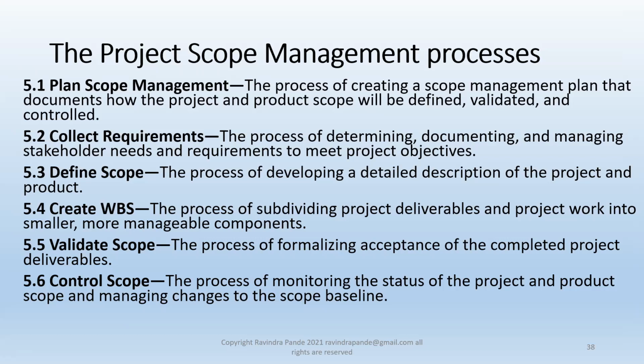Create WBS is a process of subdividing the project deliverables, the project work, and project activities into smaller and more manageable components. And we're going to do a hands-on workshop on creating WBS also. This is the base of your project plan. Whatever work or activity you disintegrate, we normally disintegrate to a level where it can be easily managed and easily estimated.